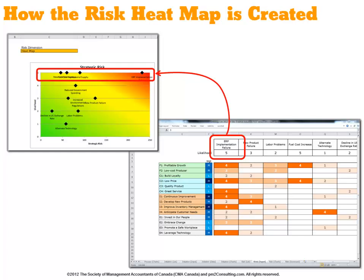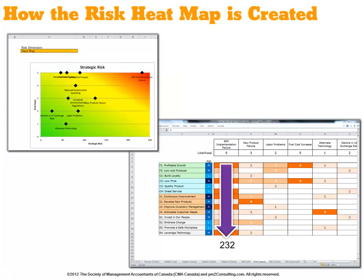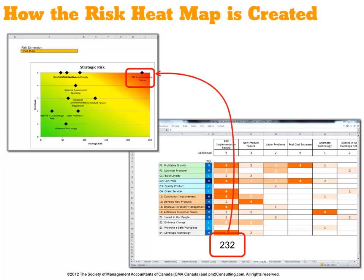We then rated the risk impact against each strategic objective, and we can mathematically add up those scores. In this case, it adds up to 232. The score is calculated by taking the risk impact and multiplying that by the weighting of each strategic objective and adding it up across all strategic objectives. So on the heat diagram, we would chart ERP implementation in the top right-hand corner with a likelihood of 5 and a risk strategy point of 232.